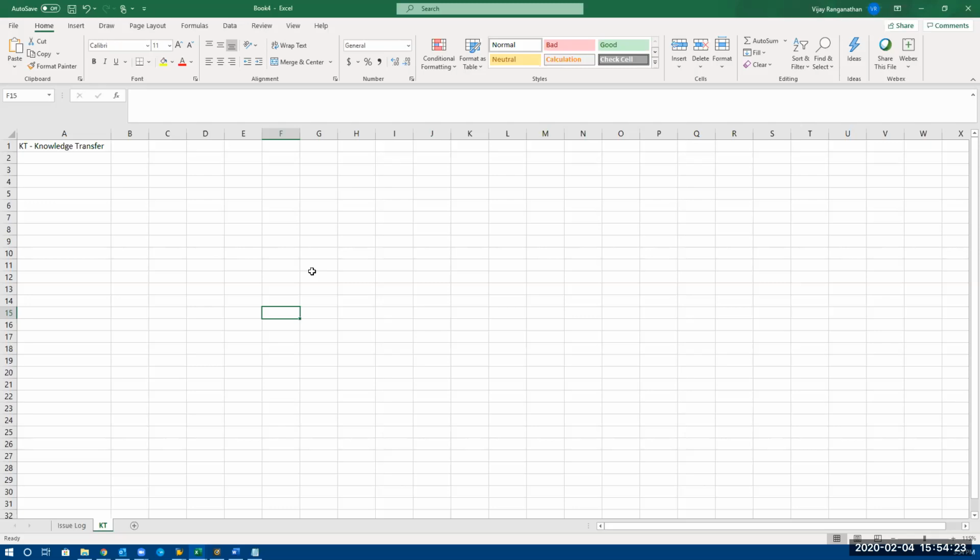Tomorrow, when you have a meeting with your manager, this is what you're going to show him: these are the KT topics, where we are, what is covered, how many percent is completed, how much knowledge you have right now, what help you need, and when you can start working independently. If you put everything on paper, that is when you know the scope of the work. Make sense?